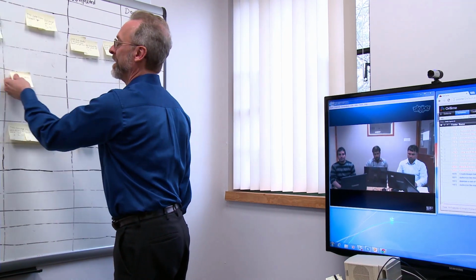So how do you actually work with your team out in India? What tools do you use to collaborate and communicate with them? We use exactly the same tools that we use here. We have a Scrum project management methodology, and that involves every day we have a 15-minute meeting where everyone says what they've accomplished since yesterday, what they hope to do today, and whether there are any impediments that need to be resolved before the next day, which the project manager or somebody else should take care of so progress can continue. And that's exactly the same process we use with people here.